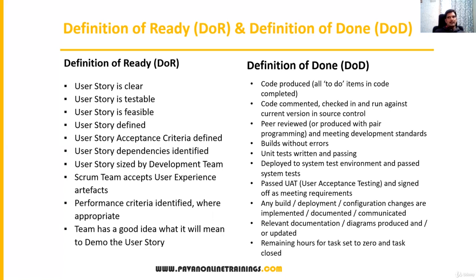Okay, similarly, when we say definition of done, it means the story is completed, the story is done. For that particular story, the developer will design it and develop it, unit testing will be completed, integration testing will be completed, test cases will be created, and testing will be done, sanity, regression, smoke, everything, and bugs will be fixed. Okay, there are no bugs in the story, it is ready for demo, and the demo is also completed. Then we can say the story is complete.